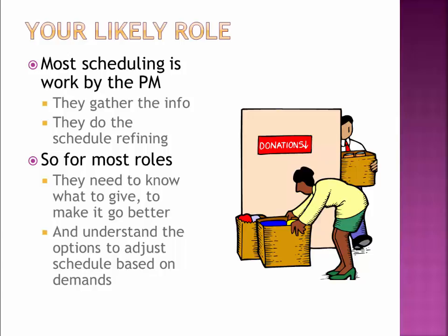I know as a junior programmer, I used to say, well, these are the 3 things I'm going to do. And the project manager would write down the schedule as A, then B, then C. And that's not the way you work. So like, let's say I'm going to code the database, code the software, test the software. And so they would write that down. So code the database. And they would come back to me after a week and say, is the database all coded? I'd be like, well, no. I mean, that's not how you do the work. You don't code all the database, then do all the rest of the code. You do the part of the database you're working on, then you do the code you're working on, then you test the code you're working on, then you go to the next thing.